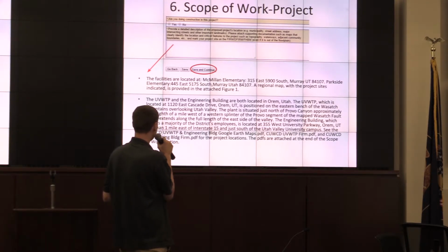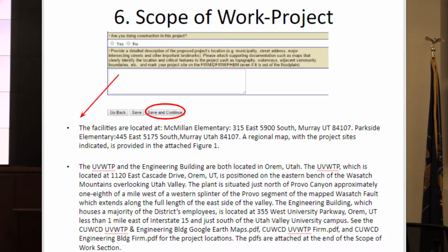Are you doing construction in this project? Yes or no? If you are doing construction, that alerts, and you're going to have an environmental historic preservation flag, because if you do construction, there are certain things that may come into play with the EHP requirements. So FEMA needs to know if you are doing construction or not.